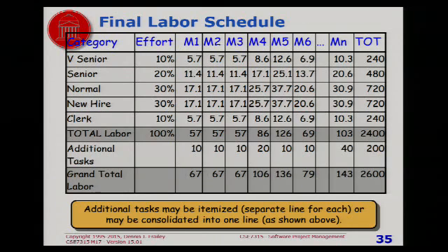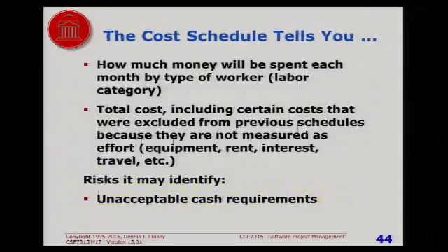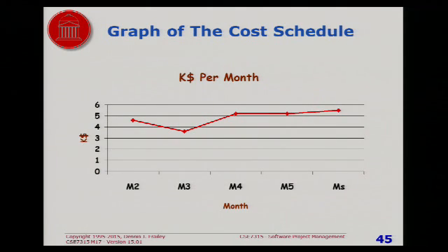But sometimes you have to pay close attention to what's going on, because here's what goes on. Let's say these are the numbers you turn in, and the project manager is trying to negotiate something with the customer, and the customer says, if you can cut the cost by 10%, I'll give you the contract. And they say, okay, I'll just cut the cost by 10%, and here's how I'll do it. You have to be aware of the fact that they're doing that so that you can protect yourself.